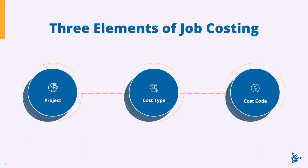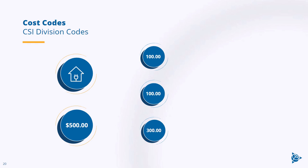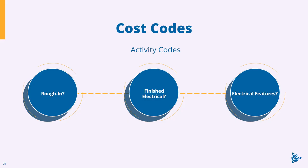Now let's get into the details on how the money is spent. Was it spent on electrical? Was it site work? How about concrete? These are all examples of CSI division codes. For example, if you spent $500 at Home Depot, you might break that down as $100 for concrete, $100 for electrical, and $300 for masonry — those are the division codes. Activity codes provide a more detailed breakdown within each division, representing specific tasks or activities. For example, within electrical, you'd want to know: was it rough-in electrical, finished electrical, or installing electrical fixtures?